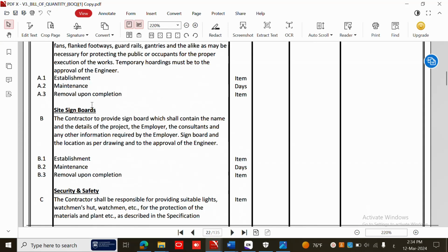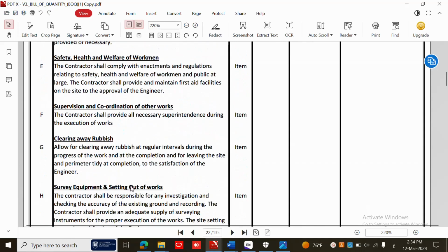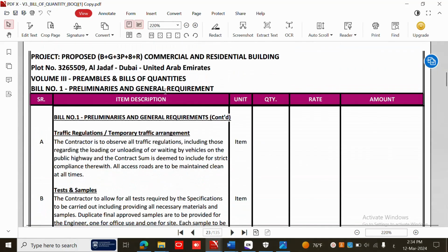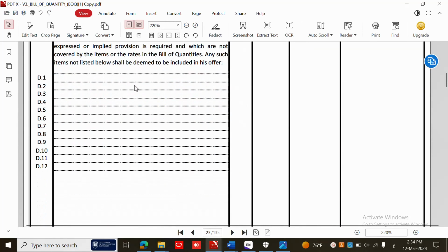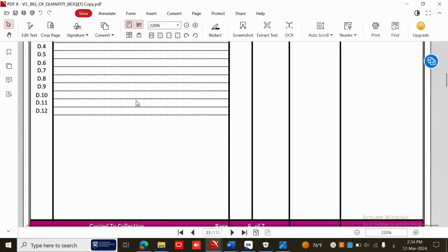Sometimes there is a complicated location for the project, and this complicated location needs a special requirement to enter the goods and the material to the site. So we have to pay more, like we have to put another price for the tower crane, for anything which can hold the things. So it depends on the project, but usually for the same size of project and the same location issues, it has the same price.